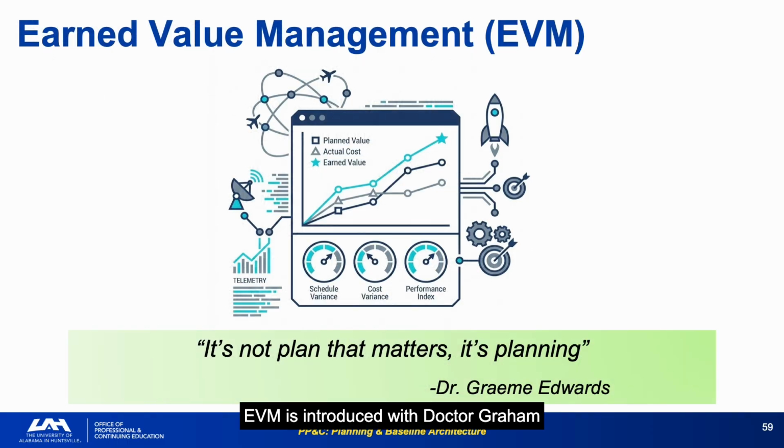EVM is introduced with Dr. Graham Edwards' quote, "It's not the plan that matters, it is the planning." To reframe the purpose of EVM, the discipline of planning produces the baseline that makes objective performance measurement possible. EVM is required for all projects in Phase C/D with a lifecycle cost greater than $20 million. But the real value is not compliance. It is the early warning system that tells you where you are and where you are headed before problems become crises.